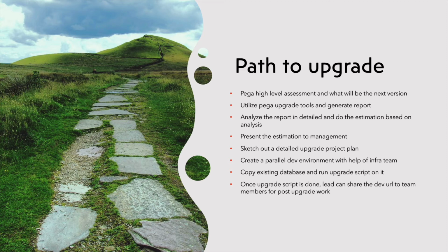Once you get those reports, you need to analyze them in detail, because only based on that analysis can you do the sizing. Estimation or sizing is very important. Once you complete the sizing, you need to present it to your management. If management is okay, then you need to sketch out a detailed project plan, that this is what will go.